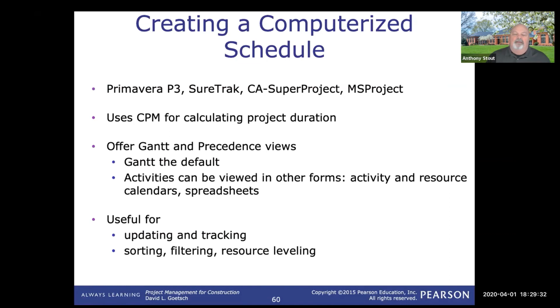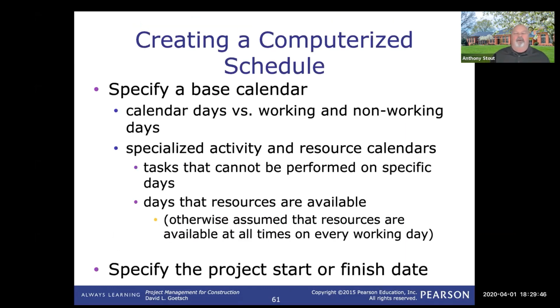So when we talk about these different things, especially in Microsoft Project, we want to define what it is we're doing, what's the time frame, what's the calendar we're using. When we define a base calendar, are we using a 5-day work week? Are we using a 6-day work week? Are we saying Saturday and Sunday are non-work days? Are we using an 8-hour workday or a 10-hour or a 12-hour workday? Those are all things that we can put in the baseline calendar in how we're going to define the project and work from there.